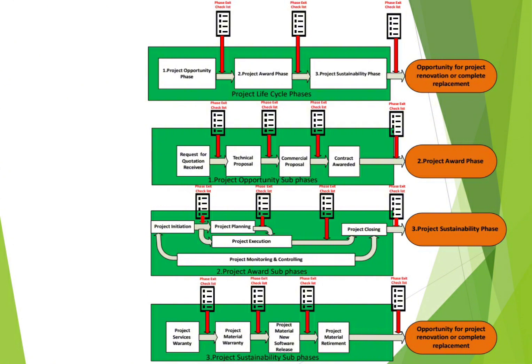So during this project initiation phase, you also need to have an external kickoff meeting with your customer. The same will happen as what you have done internally. Now you will do it with your customer. You need to go quickly through the contract, agree on the milestone dates, discuss if there's any change on these milestone dates. Maybe there are some updates from the site, from the end user. All of this needs to be discussed.